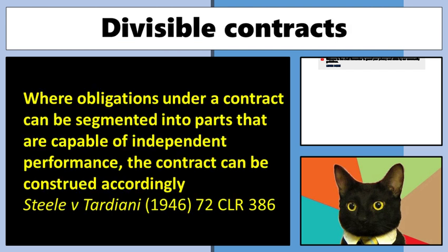Now, the courts, again, are not destroyers of bargains. They don't like people breaching contracts and bringing contracts to an end. And so one of the rules or principles that they've developed is in situations where a contract can be chopped up into smaller, divisible obligations, the courts will, wherever possible, to try and uphold the bargain, do so.